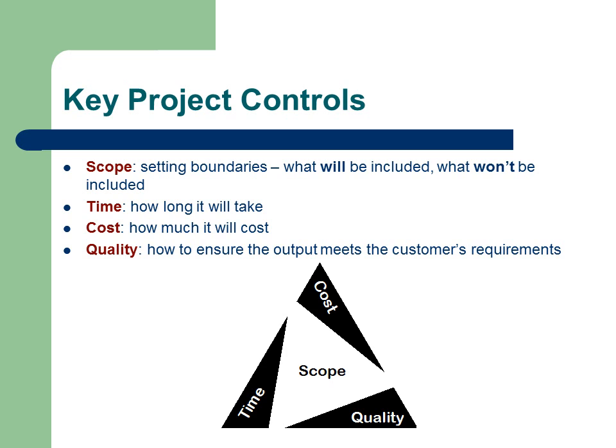For example, if a project gets behind schedule, then in order to rectify the situation, it is necessary to either spend more money on more resources or overtime, or perhaps reduce scope. The option of compromising quality is not recommended, as it should only be done with extreme care and full approval of the customer. The key project controls are the major focus of all status or project reports and will provide the project sponsor with a picture of the health of the project.